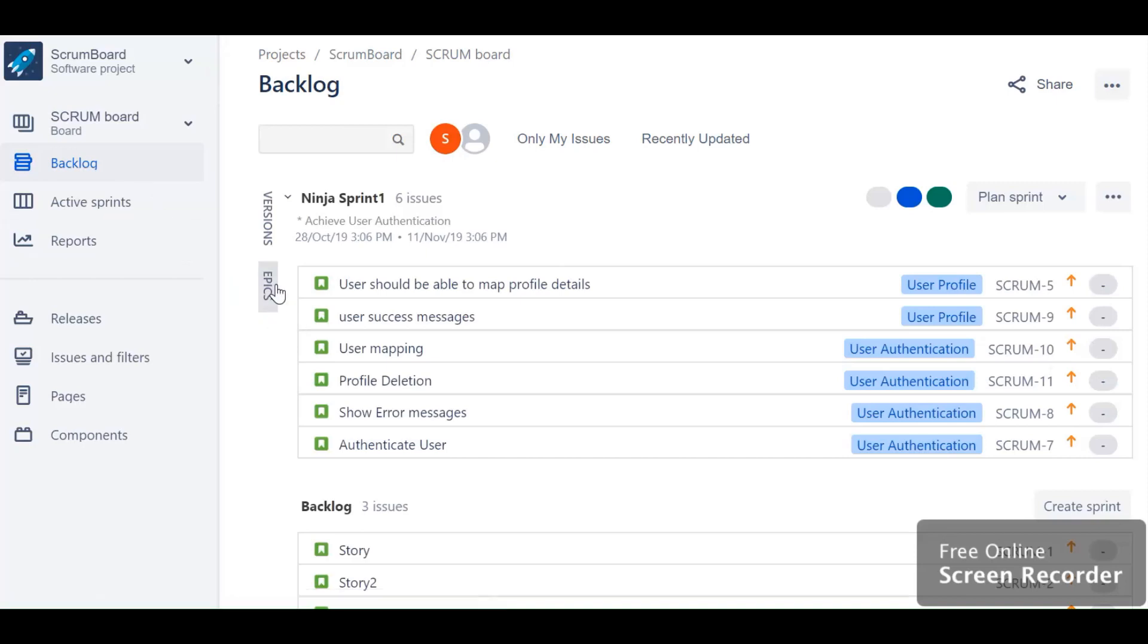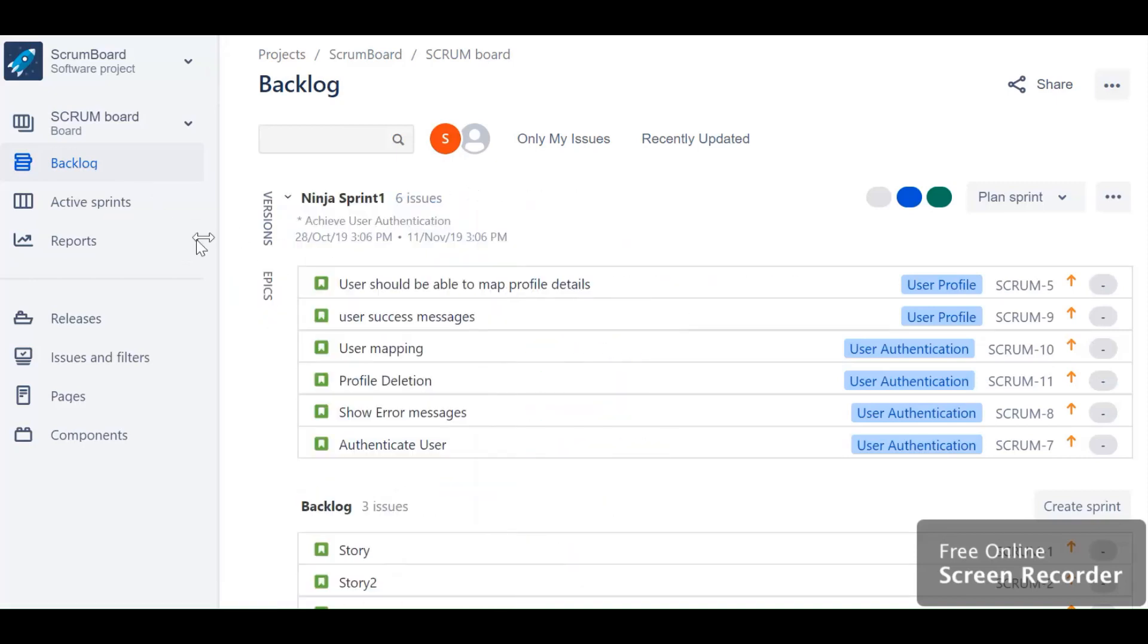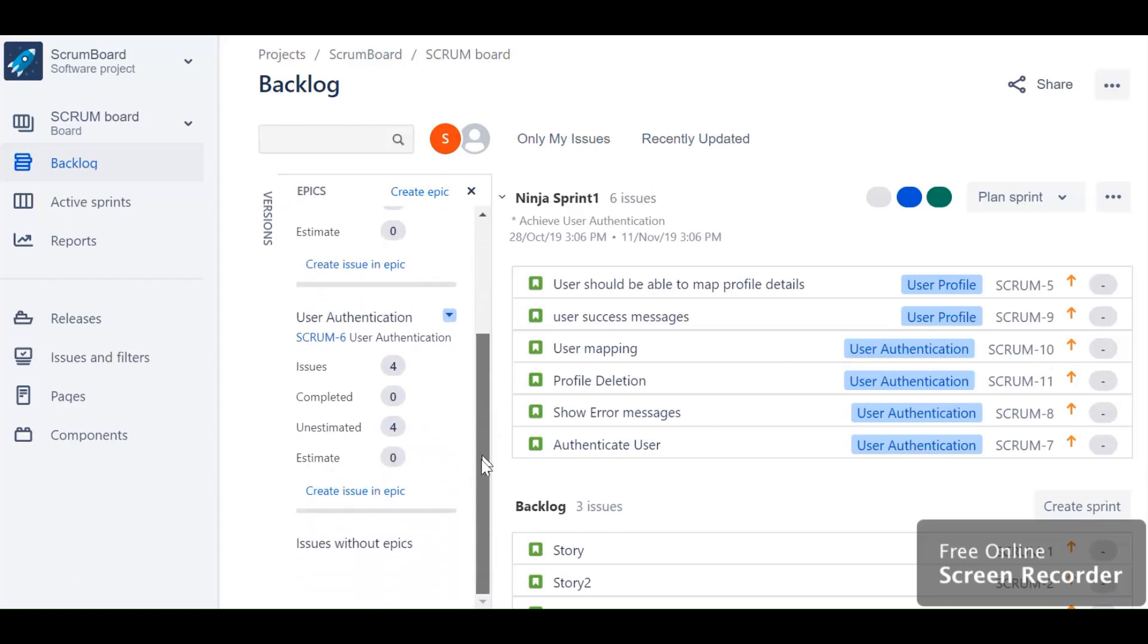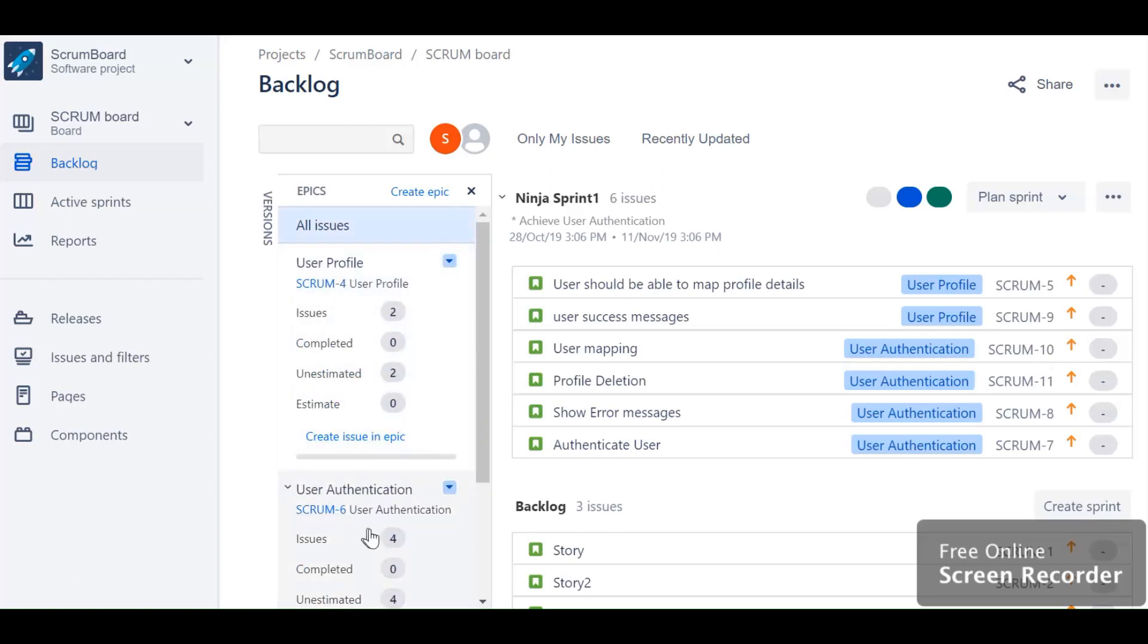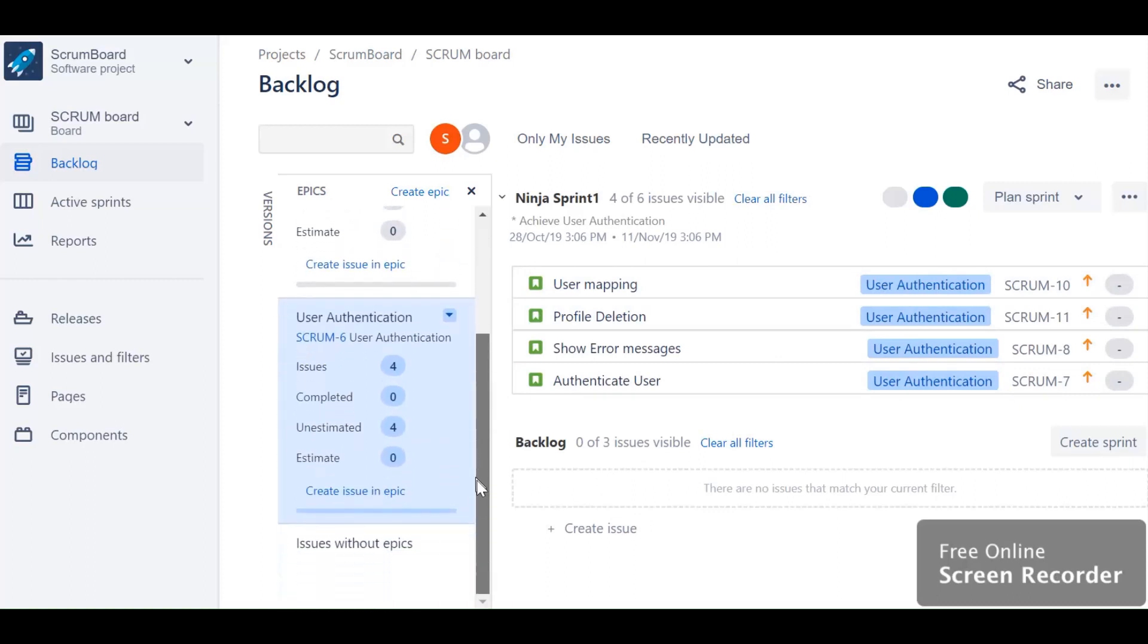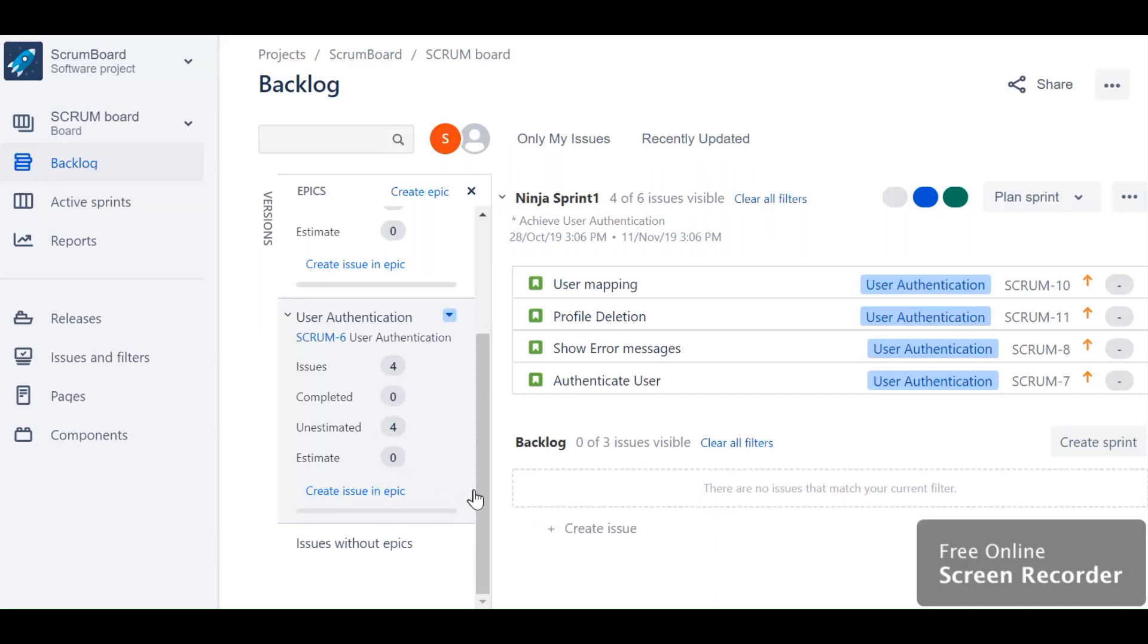Here JIRA gives you an option to select your stories or backlog items based upon version and epics. If you click on epic, you can see all your epics over here. In case you just want to see the information related to user authentication epic, select this epic. Only the user stories which are related to this epic will appear over here. This gives us more information - for example, there are only four issues in this epic, out of which zero are completed, four are unestimated, and zero are estimated. You can even create an issue or story from here itself.